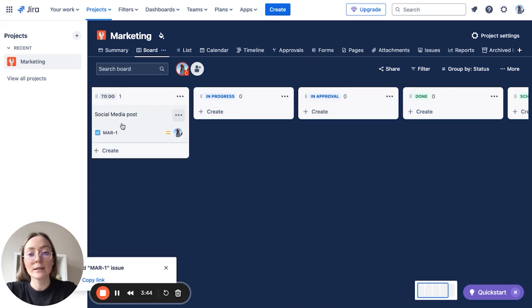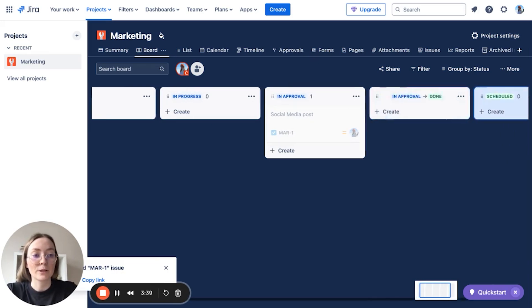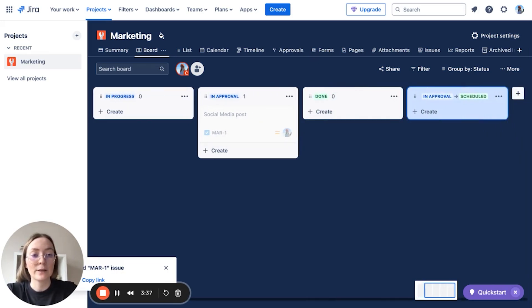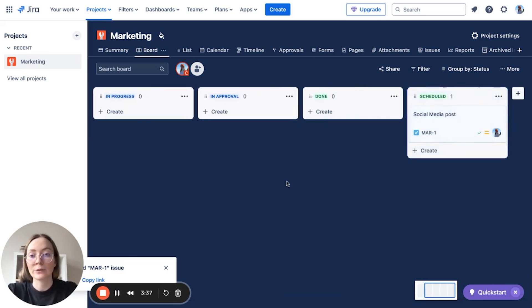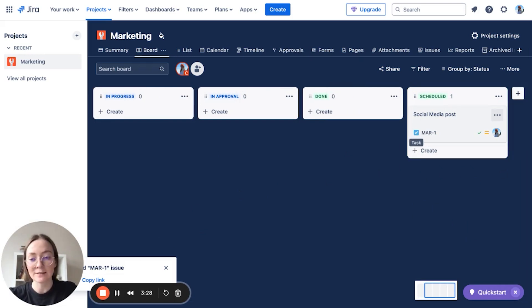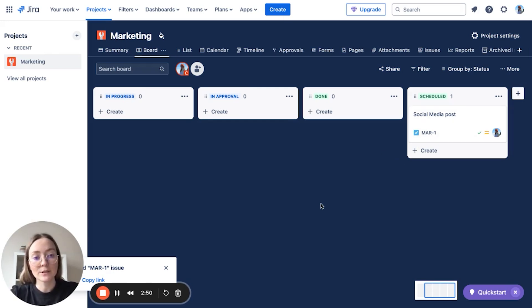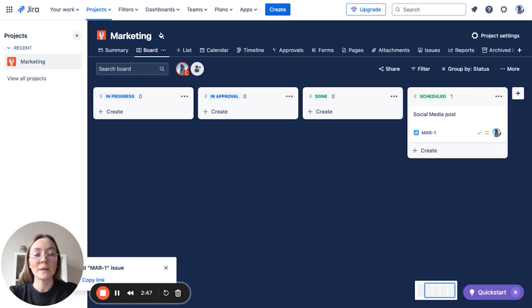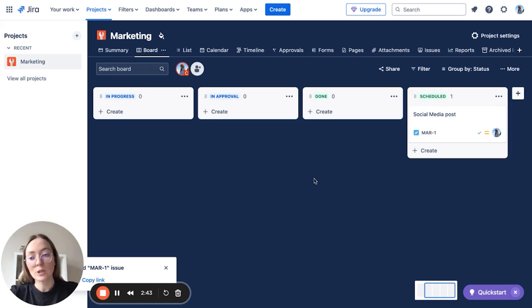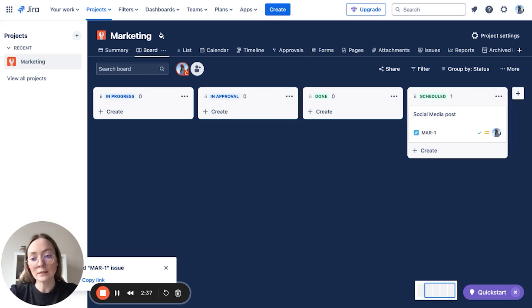And this is how you move it when your work is moving forward. And let's make it scheduled. Now you can see the very little icon here which means the issue type. Here we have task. Jira by default has three issue types: the most common issue types in Jira are epics, that means the larger part of the work that has to be done, tasks, the single one task, and subtask for breaking down the task into smaller steps.